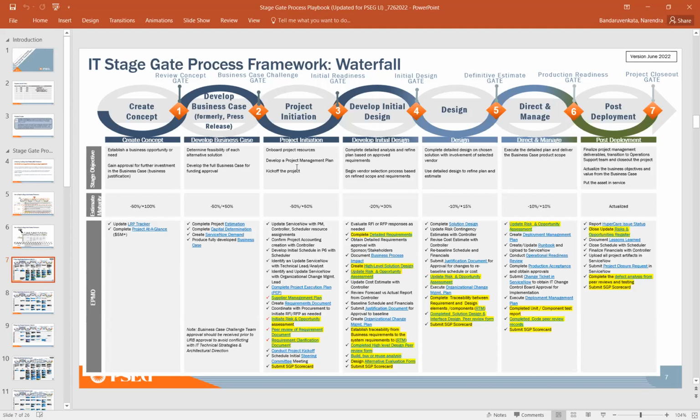the gates. Once the initiation stage is done, where you will be getting all these financial discussions with the vendors and engaging the vendors, initial discussions with the cybersecurity team or the integration team, etc., then you will be consolidating slowly the business requirements into the detailed requirements. And then your estimates will go up a little bit in terms of cost. So you can see, instead of being 50 to 100% deviation, you are now coming into the range of plus minus 50%. Then next stage is the initial design.